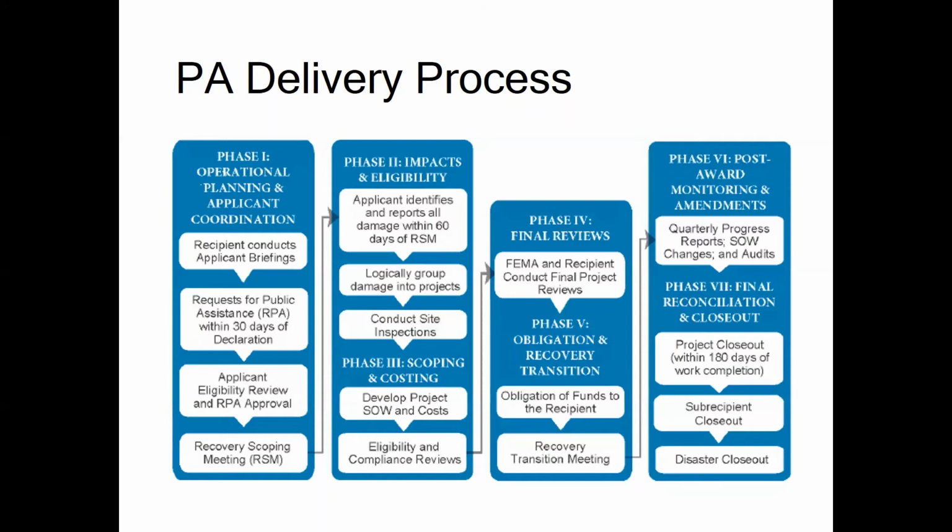Applicants must identify and report all incident-related impacts to FEMA within 60 days of the RSM. To do this, the applicant will prepare and submit a damage inventory. As the project is formulated, information is entered, uploaded, and updated in FEMA's Grants Portal.